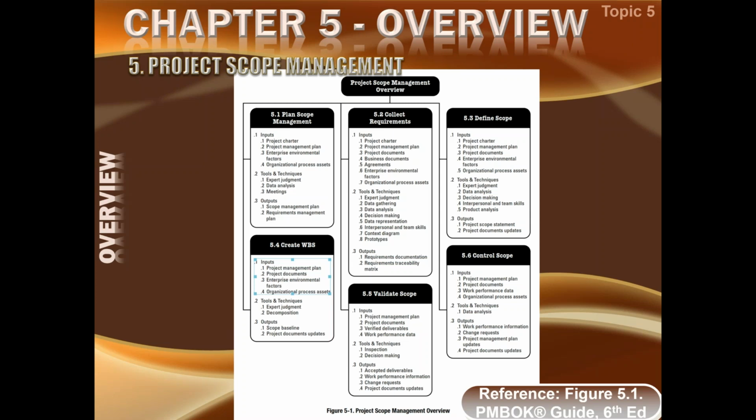So we are entertaining the stakeholder. We are listening to every desire they have, writing it down, putting it into a requirement document and developing a requirement traceability matrix. But many of these requirements will be dropped out after discussion with the stakeholder when we are developing the product scope.